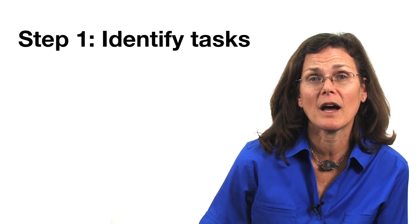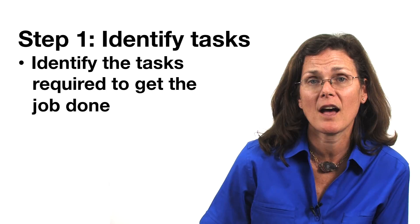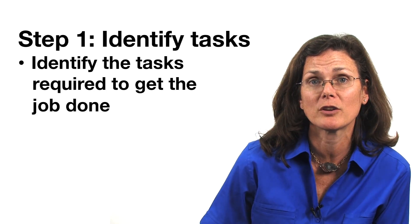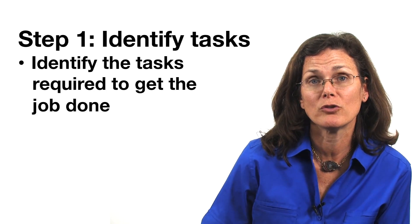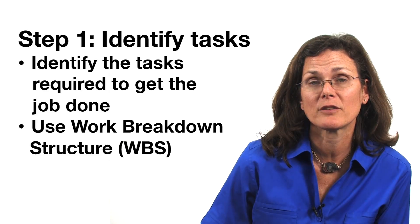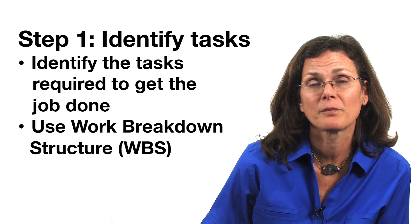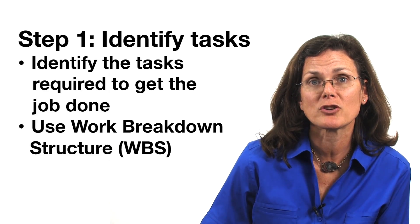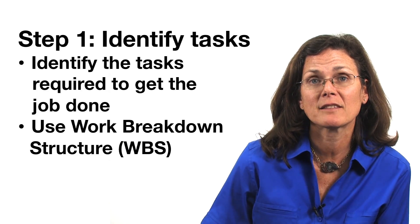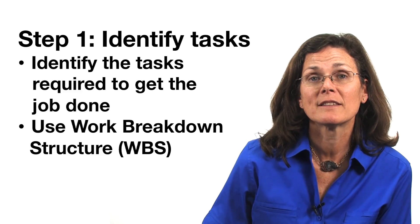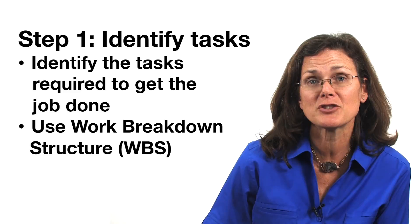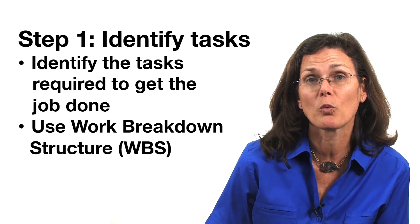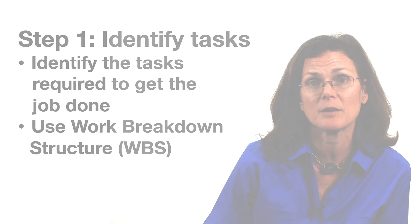Step one is to identify the tasks associated with your project. One tool that you can use to do this is called a work breakdown structure. In a work breakdown structure, the tasks needed to accomplish your project are subdivided into smaller sub-tasks, each of which are well-defined and manageable by the team.